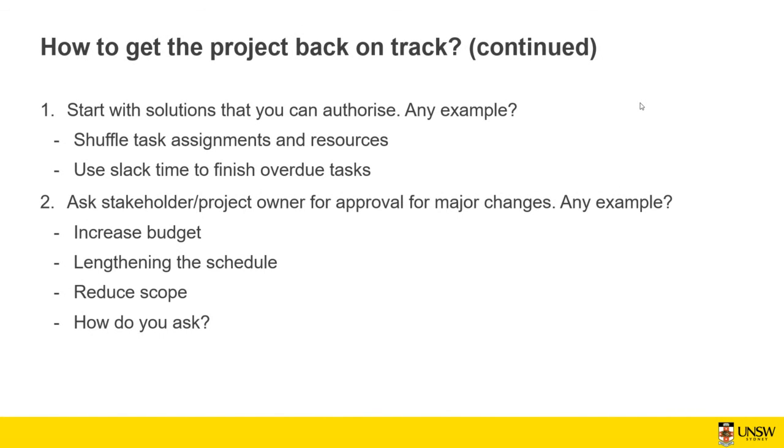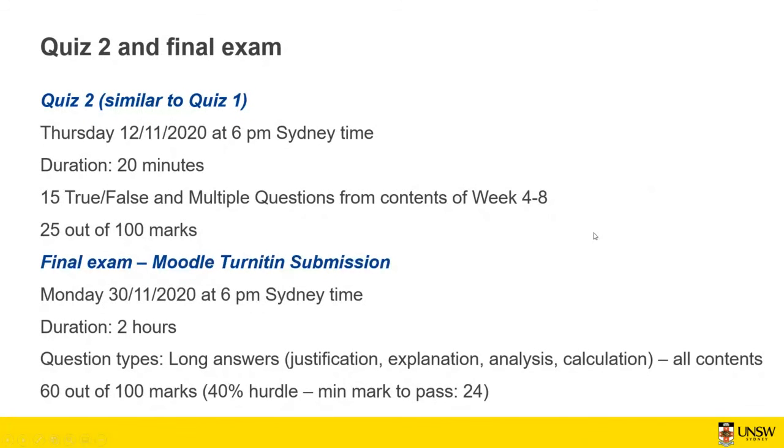Okay, I think that's perhaps the last question I answer. If you have more questions, I can wait after the lecture and then we can discuss in order to save time. So in what situation is BAC not equal to PV? So BAC is only going to be equal to cumulative PV just at the end of the project. Other than that, the BAC is something different compared to PV. Okay, so I'll get back to your question after we discuss the quiz and final exam. If you can stay on after the lecture finishes, I can answer all your questions.